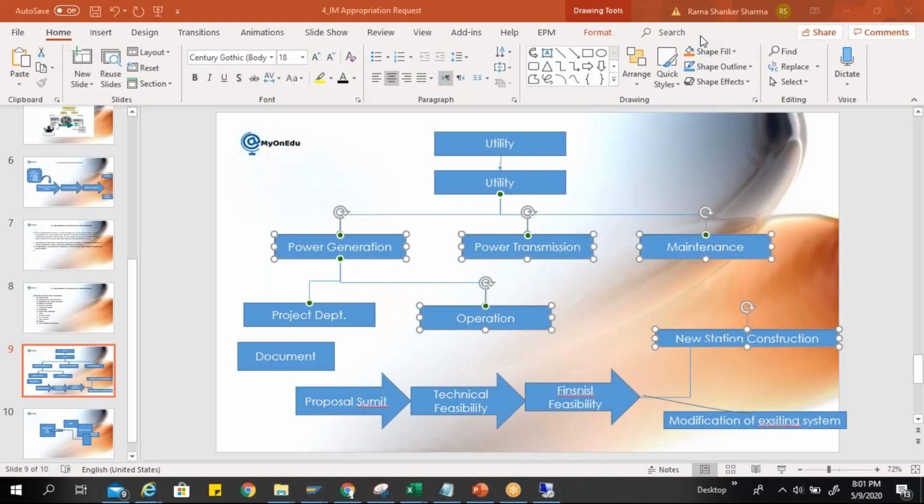But the distribution of budget and distribution of plan values will not be easy. It will not be exactly in some proportion, or it has to be done manually in the project. I think one-to-one is a better option, right, Rama? Right. That's why I'm saying it's the best practice.